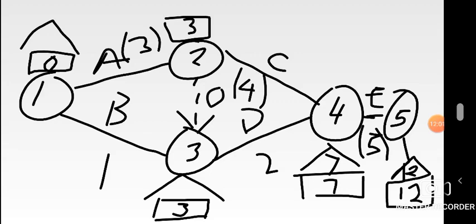It's not always that they match, but depending on the criteria we're using, going backwards, from a certain number to another number, if it appears that the earliest start time and the latest completion time are the same, then we're good. But most of the time the rule is just that on the last node, the earliest start time and latest completion time are always the same. We're on 4. Where next? We can go to 2 or we can go to 3. Let's go to 3 first. So we are on 4 going to 3. There's only one route leading to 3 from 4, right?